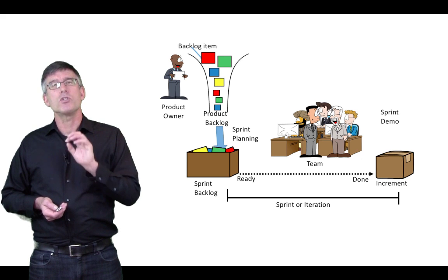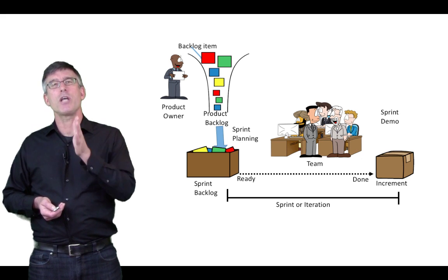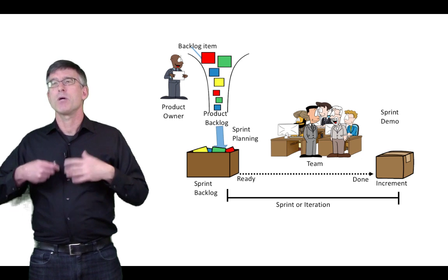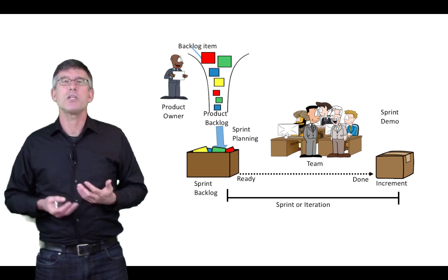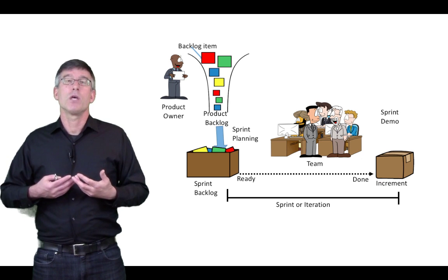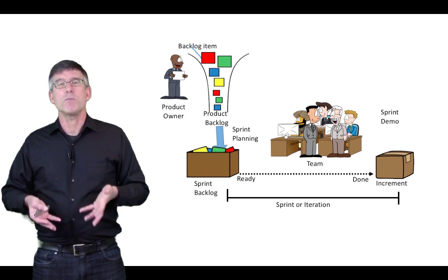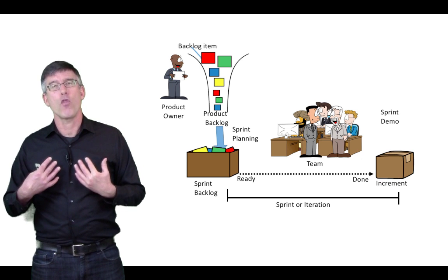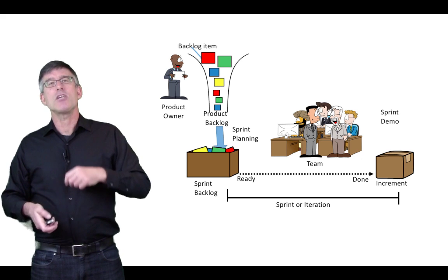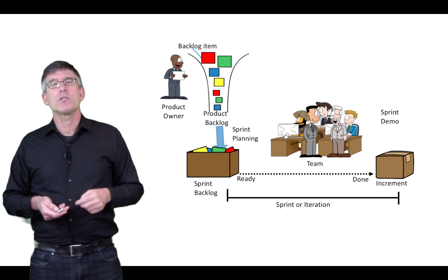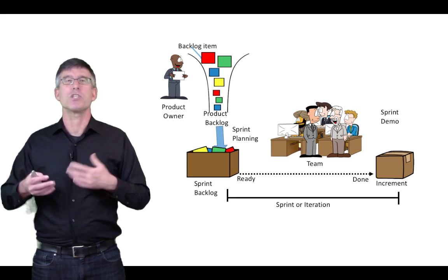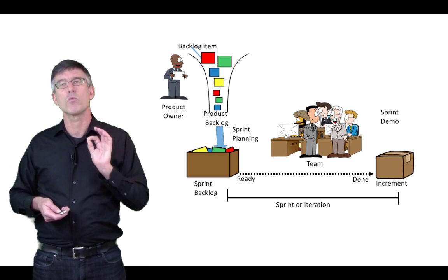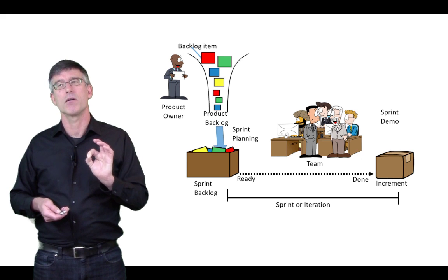But in Scrum, the product owner should have work being presented to him and accepted all throughout the sprint. But regardless, the sprint demo is intended to be an opportunity to show off the work that the team got done. Ostensibly, it's to get feedback on the work that was accepted and use that information to take into the next planning session. We can see how things are actually working, and maybe that'll twig some new ideas as to what really is valuable in that product backlog.